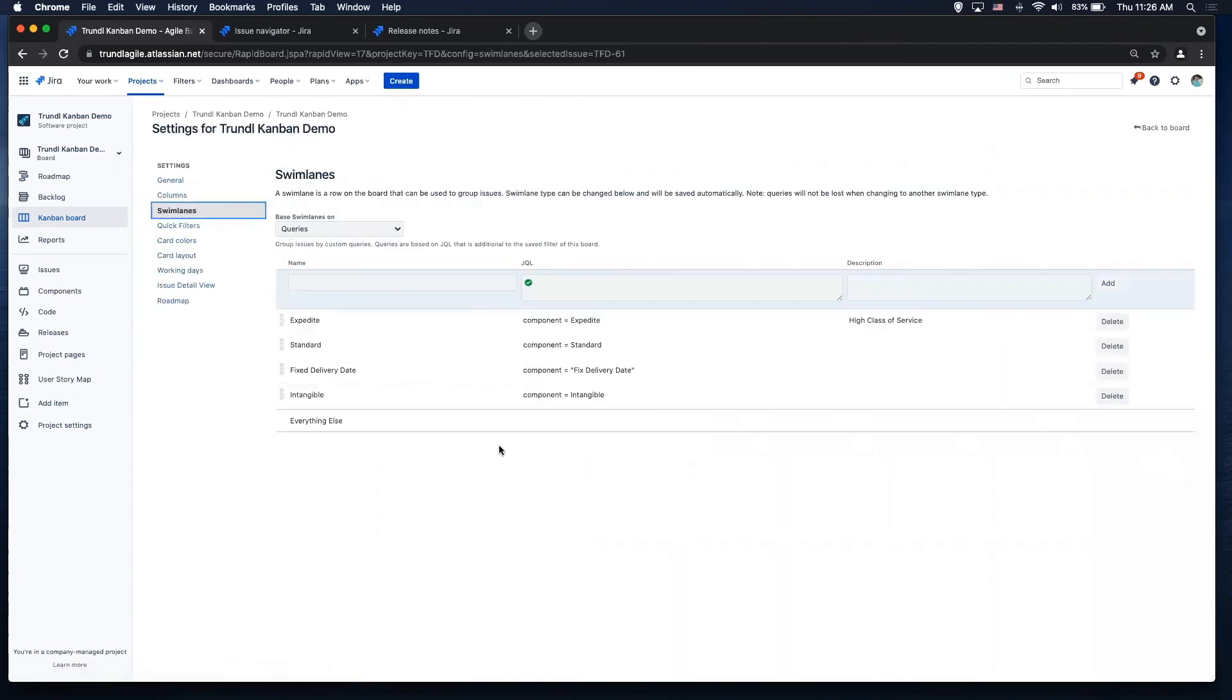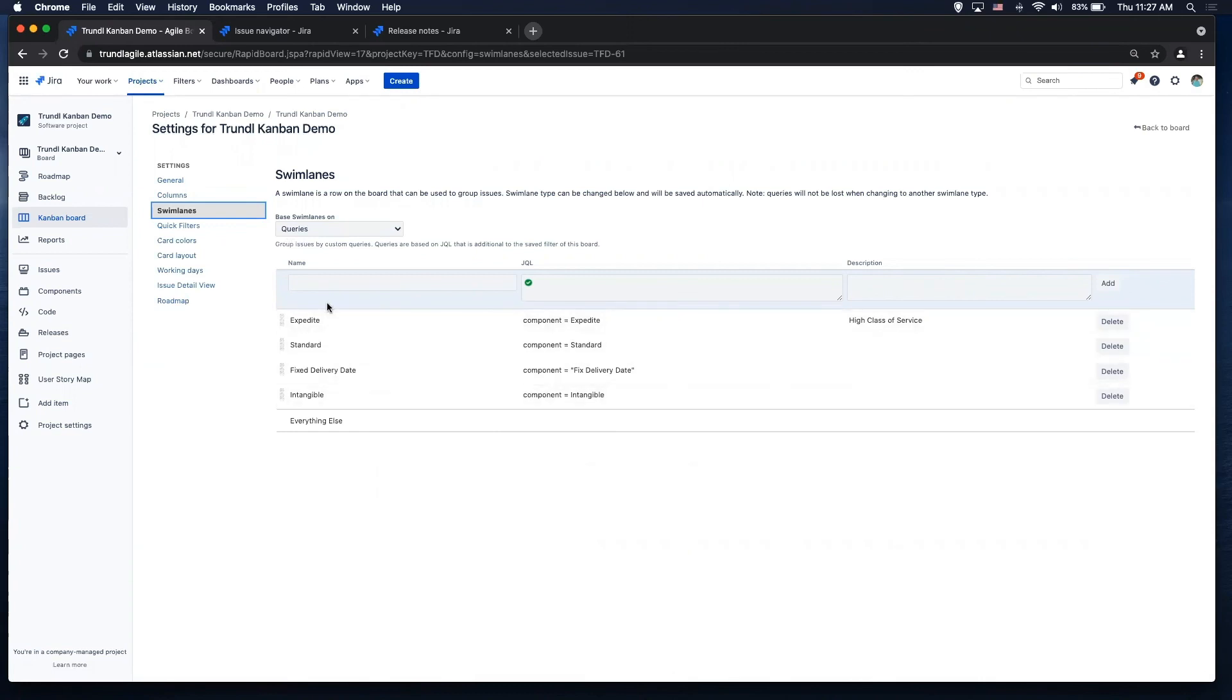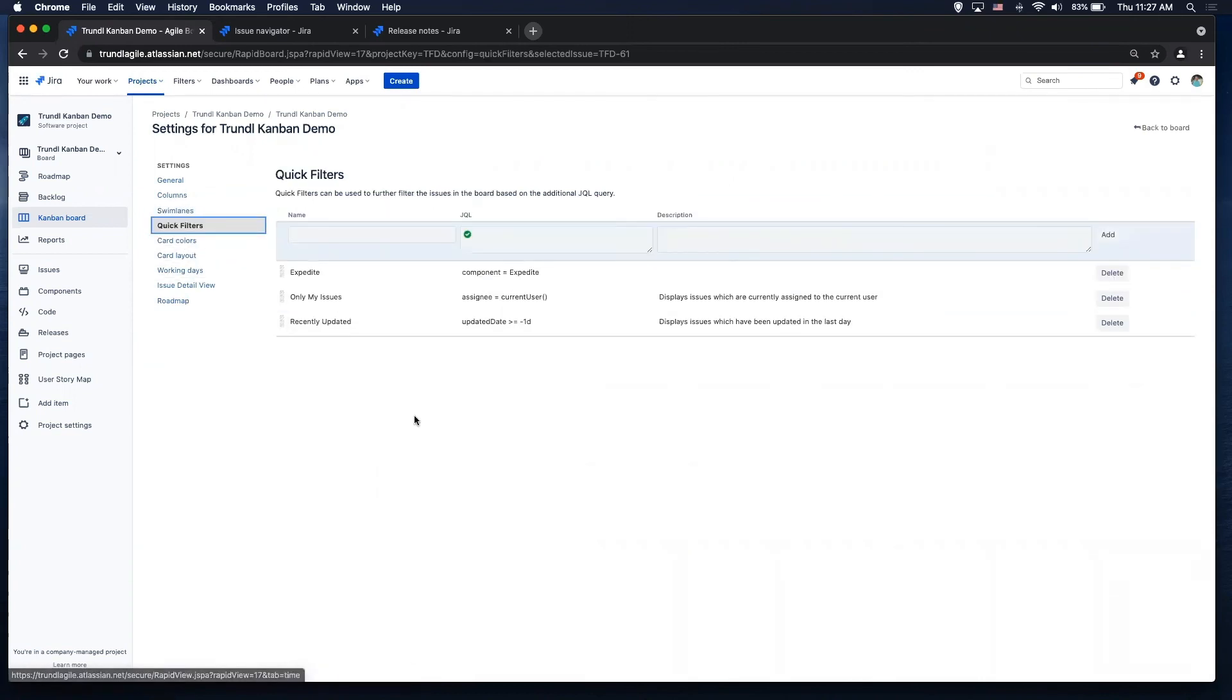I can also set swim lanes. So what I'm doing with swim lanes is my class of service. So it's basic JQL, showing the component equals expedite, and that's going to create my swim lanes. I can also do quick filters and I'll show you what those look like on the board.